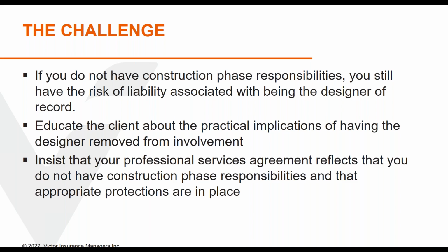And then finally, you have to make sure that your professional services agreement reflects that you do not have construction phase responsibilities and that there are appropriate protections in place. Because if your standard agreement or the client's standard agreement assumes that you'll be providing construction phase services and the contract says one thing and what you're doing is different, you want to make sure that what you're actually responsible for is reflected in the professional services agreement.